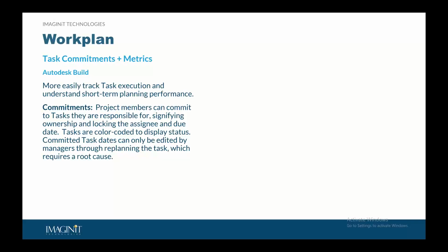So with this first work plan release, commitments, subcontractors are going to be able to commit to a task, which is then going to lock in the assignee and the due date from being edited or moved by anyone except for the manager. That's great. That's essentially just an additional permission that we've set up in here. Once that task is committed, those task dates and ownership can only be, again, replanned by the manager.